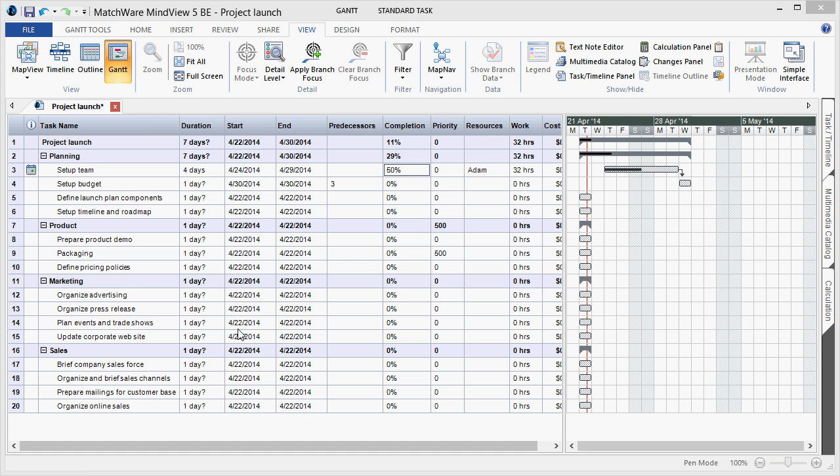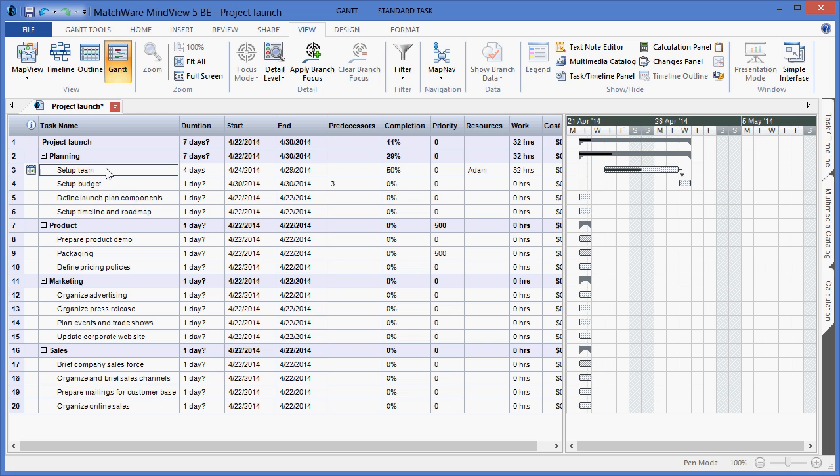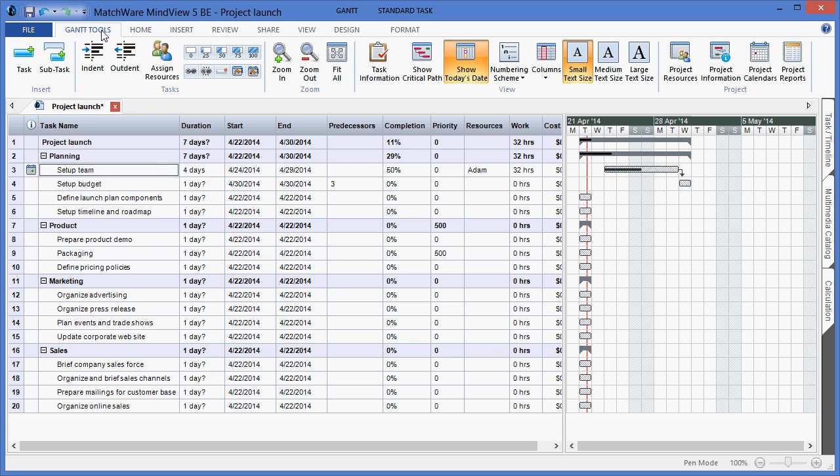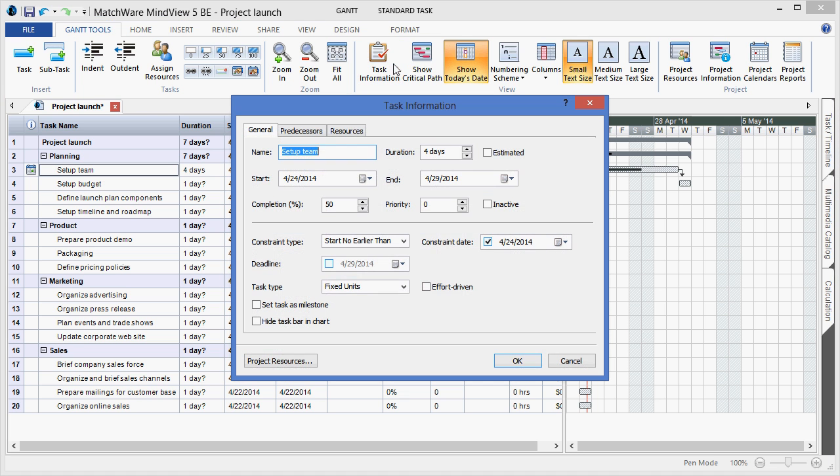If I need to add additional task information, I can choose the desired task from the outline, go under the Gantt Tools tab, and choose to launch task information. Task information gives me the ability to update things like the name, duration, estimate or accurate dates, start dates and end dates, completion levels, priority levels, or even make a task inactive in the Gantt chart.